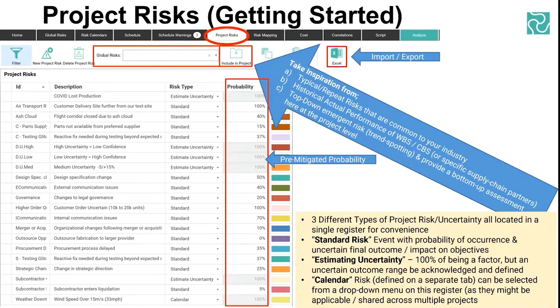However, we've made some advancements and evolved it a bit. You can very easily create a new calendar risk based on actuals. So if you have real life telemetry data from a weather station for, say, one year, I'll show you how you can do that, make it last for 10 years for an upcoming project. An evidence-based approach is always good.